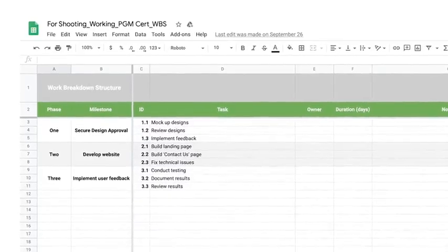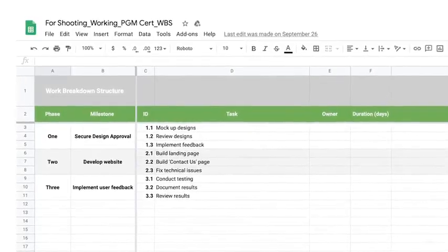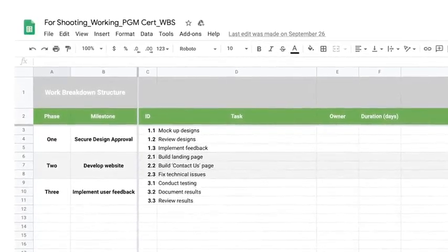Keep in mind that in future project management roles, you'll likely create a WBS that outlines the tasks for an entire project. It's also important to note that while creating a work breakdown structure is a helpful exercise for visualizing the tasks of a project, you wouldn't typically include this type of diagram in your official project plan. Instead, you'd input the tasks identified through this exercise into a spreadsheet or your chosen work management software, where you can more easily assign owners to each task.